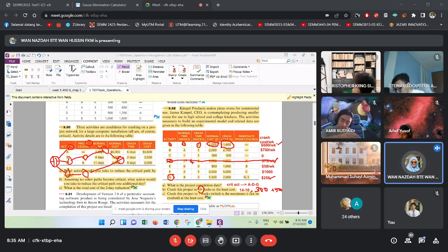The one is 3, 3 plus 3 is 6. So that one is 7. Still the same, because the earliest start for G remains 8. Good. You still have 12. It's correct, just the time for D was wrong.